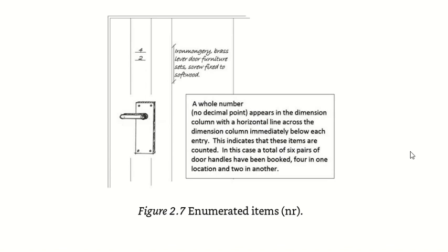What else? Yeah, this is a door knob. This item, not the door, only the knob. So you can see the numbers are mentioned here, 4, 1 and 2. Both of them are numbers. 4 is a number, 2 is a number. Total 6. I can add them, right? I can add them because they are the same type. And the description is mentioned here: what type of knob we have, material, and it's for doors, and it will be fixed with screws. So everything is mentioned here.